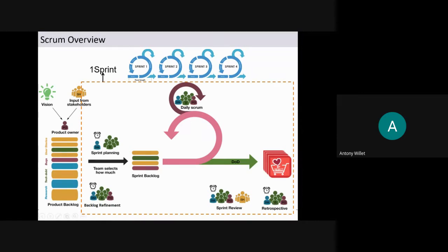That is what they discuss in the sprint retrospective meeting. So there are two meetings. One is the sprint review meeting, in which they show a demo to the customer and get the customer feedback so that they can incorporate it in the product backlog. Another ceremony is the sprint retrospective meeting, where only the team is present.